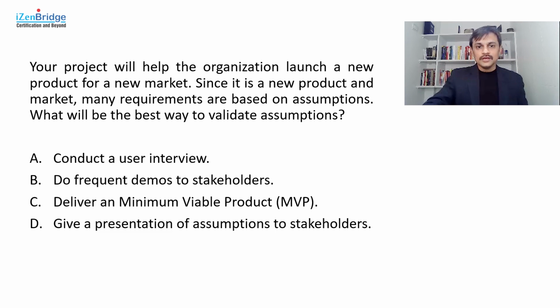Deliver a minimum viable product. Now, in my view, this is the best option. Reason is when you are asking or showing, the individuals are giving feedback based on what they read, based on your presentation or an interview. But when they are using something, they are experiencing something, you may also end up knowing many things which they may not explicitly tell you.